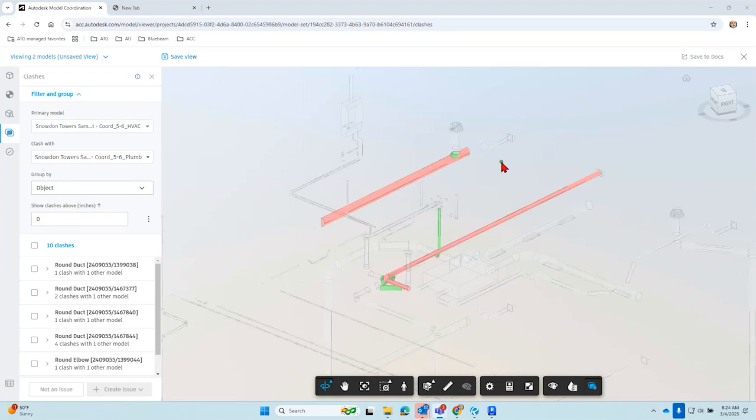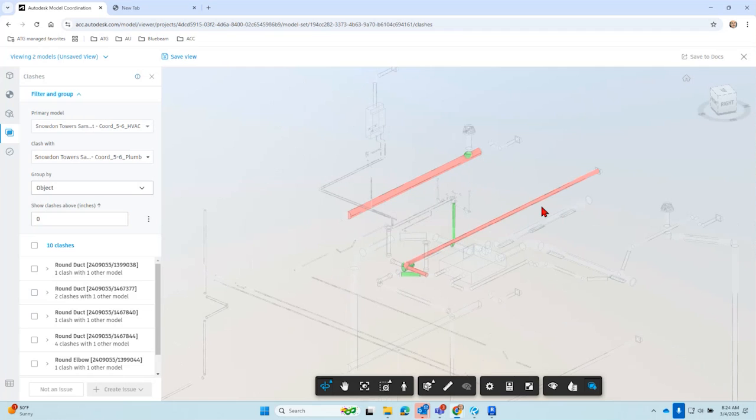Okay. So being aware of that coordination aspect here, this is built around the ability to do clash detection in the Autodesk Construction Cloud platform, linking issues directly into the design software if you're using Revit for those clashes, of course. And this is just built in. As long as you have BIM Collaborate or BIM Collaborate Pro, you have the ability to create what's called spaces and then initiate those spaces for team members for clash detection. Now, for users that are just users of Docs or don't want to run model coordination, you still have access to their models. If you wanted to run it yourselves, you essentially could, but you would want to create some type of standard.